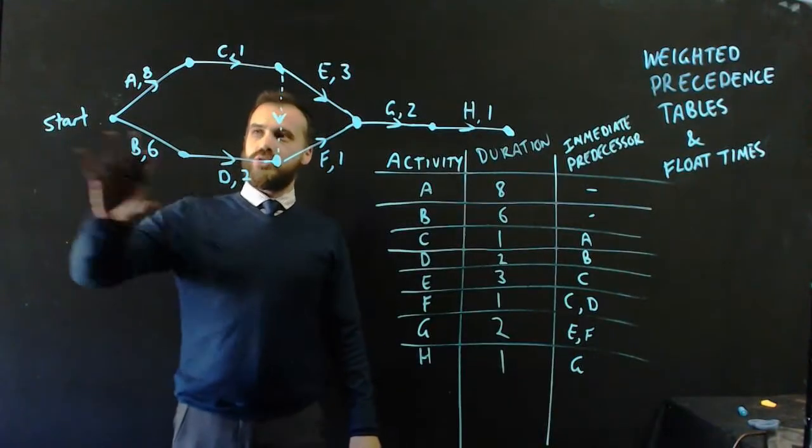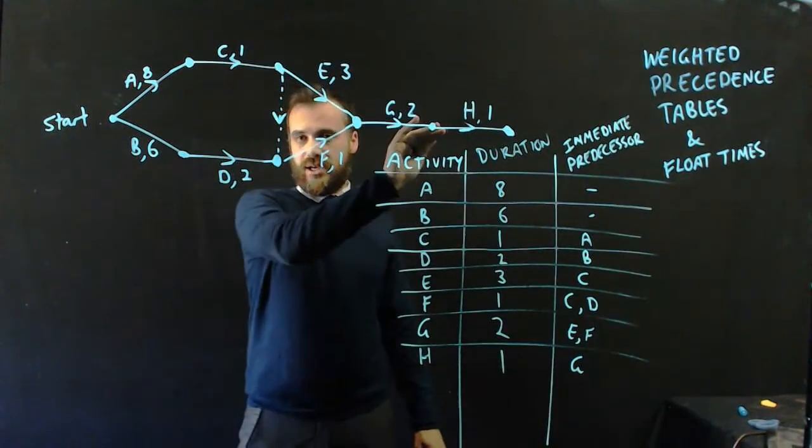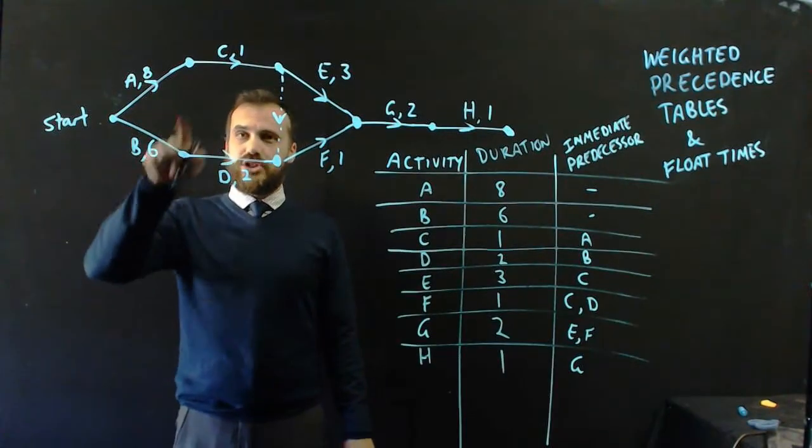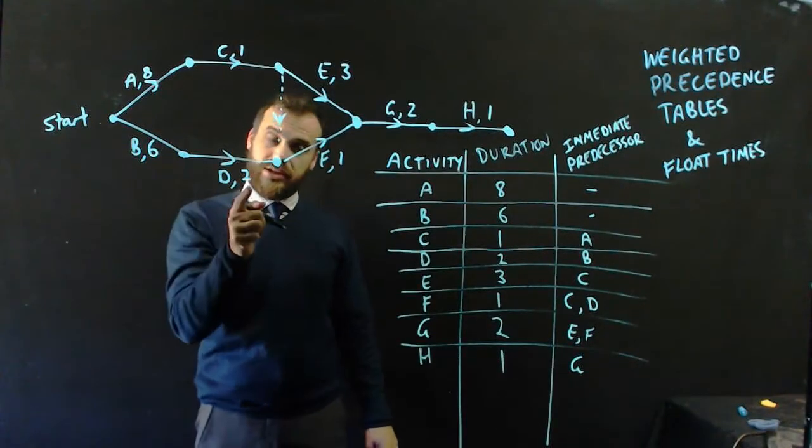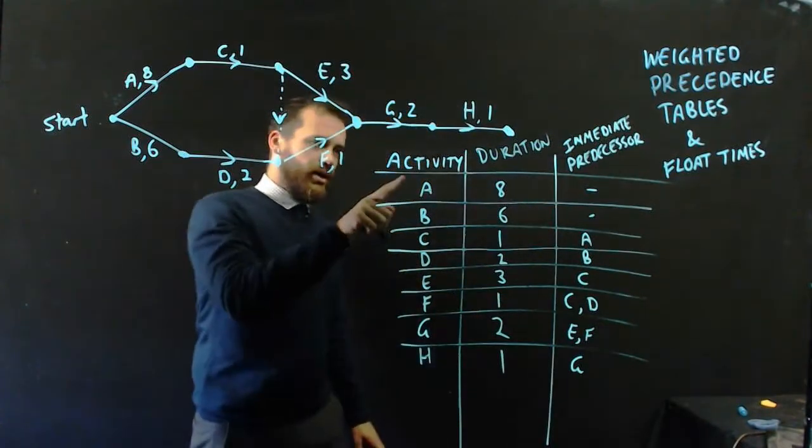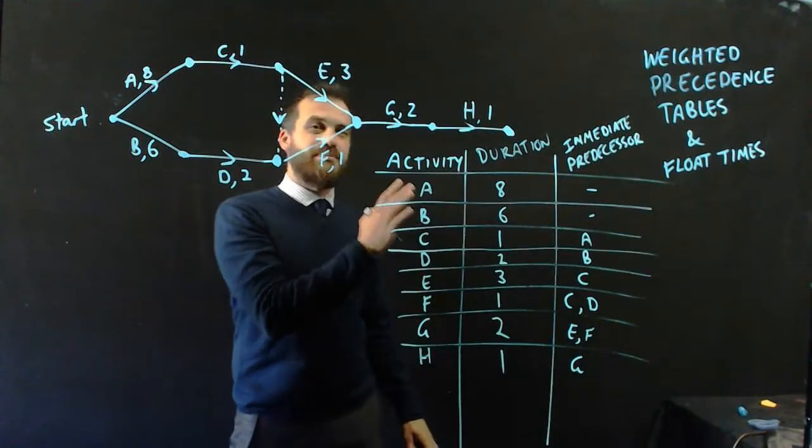Okay, so what have I done so far? I've looked at what's called a weighted activity network, which is just like the other activity networks we've done, but now we have durations for each of our activities. And now I've created what's called a weighted precedence table, with this duration column in the middle.